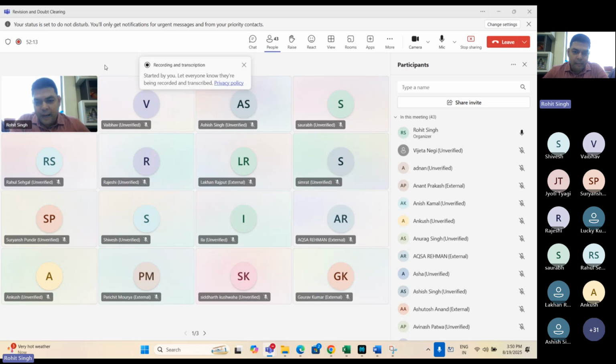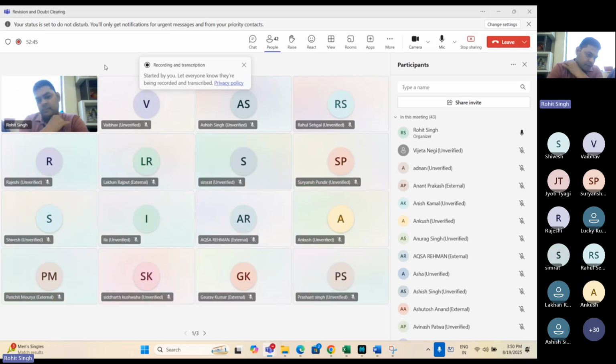Sprint planning means before the sprint starts, I am planning the sprint: number of tickets, prioritization of tickets, time estimation, who's going to perform, the RACI matrix, who is responsible, accountable, consulted, and informed in these tickets. So I'm doing the sprint planning. What we call time estimation, resource allocation, task delegation and ticket prioritization for the sprint. So that's your sprint planning.